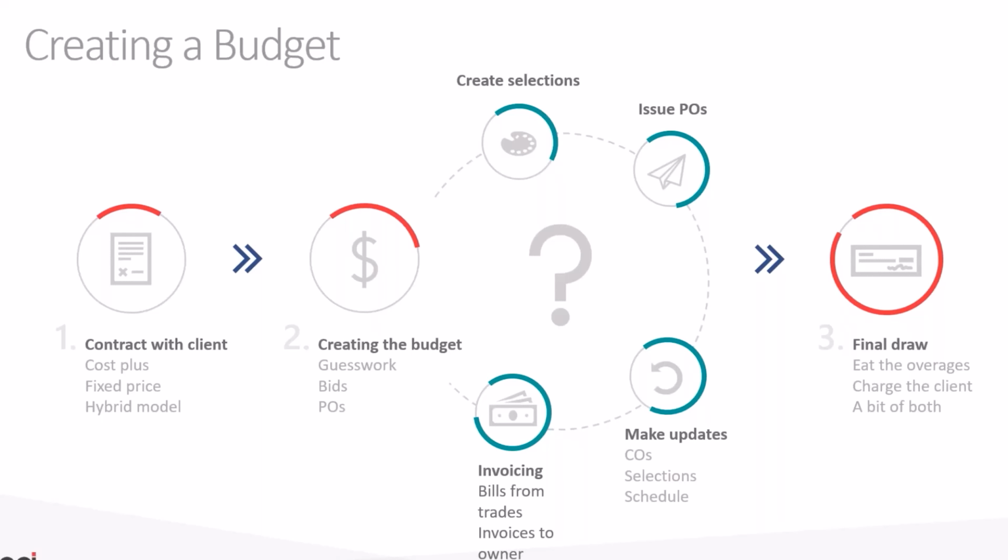So for example, some of us have cost plus agreements that we prefer, and we may use multiple variations of this as home building organizations. We may change it based on the project, based on the customer. So the most common types of contracts out there are cost plus, which means essentially we're going to open the book. And so the end consumer is going to understand every aspect of the budget from the ground up, and they are going to pay us a fee for managing the job.